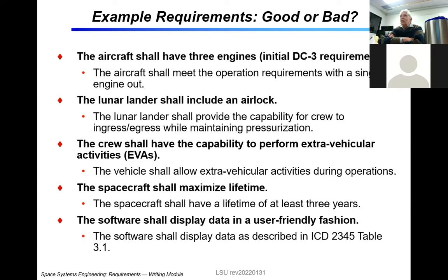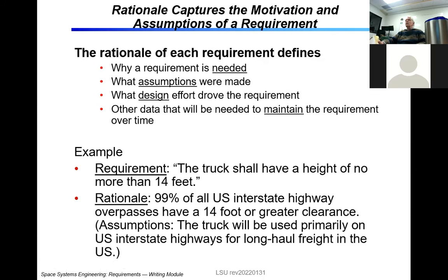The spacecraft shall maximize lifetime. "-ize" word, wrong. Spacecraft shall have a lifetime of at least 3 years. Oh, love this one. Software shall display data in a user-friendly fashion. Software shall display data as described in ICD 2345 table 3.1, where it actually specifies what that user interface looks like. So that's the difference between good and bad.